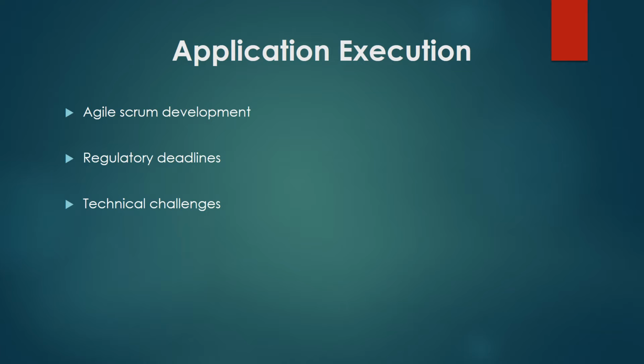So there's a product that Sovos is building or has built for that. At the same time, they're building this ACA product, and then they're also keeping their other product lines afloat as well. So resources was the major constraint on their end, because these other products were demanding as well.